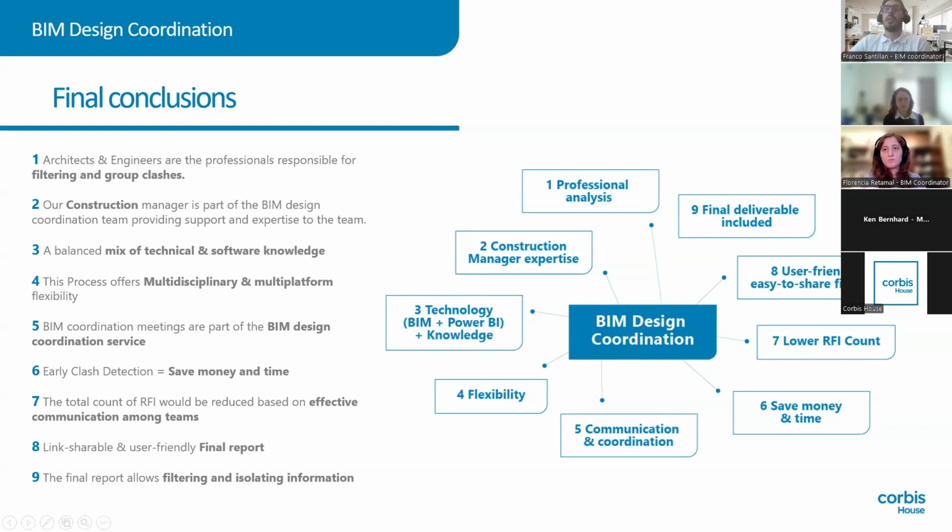Number 6, early clash detection equals saving money and time, because we are anticipating different issues before the construction phase. And this is basically translated into lower RFI quality and quantity before the construction phase. So we will arrive at the construction phase with a fully coordinated project.